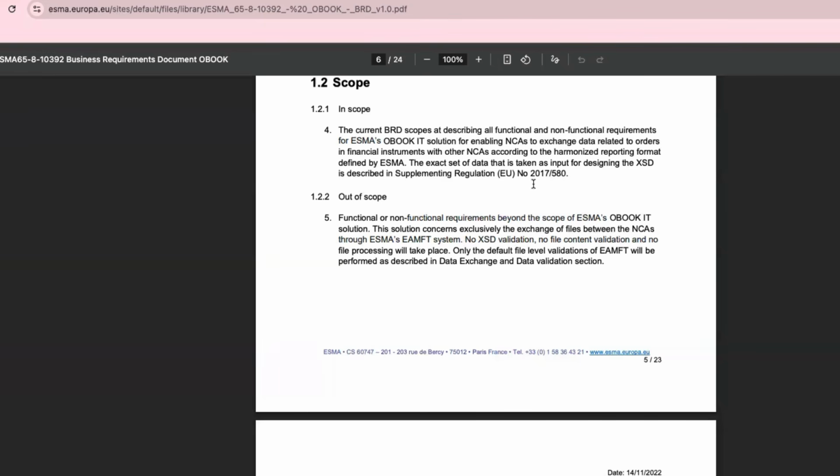Once a scope creep is identified in a call, you are not going to promise anything to the business owner, telling them, okay, this will be done in the next 2 weeks. You should not do this. Number one, don't promise them anything, because you don't know how long it's going to take to finish that work. Number two, you have to inform your leadership, your project manager, your scrum master, your product owner, your scrum team, everybody. You have to inform them there was a scope creep identified and we need to fix this.